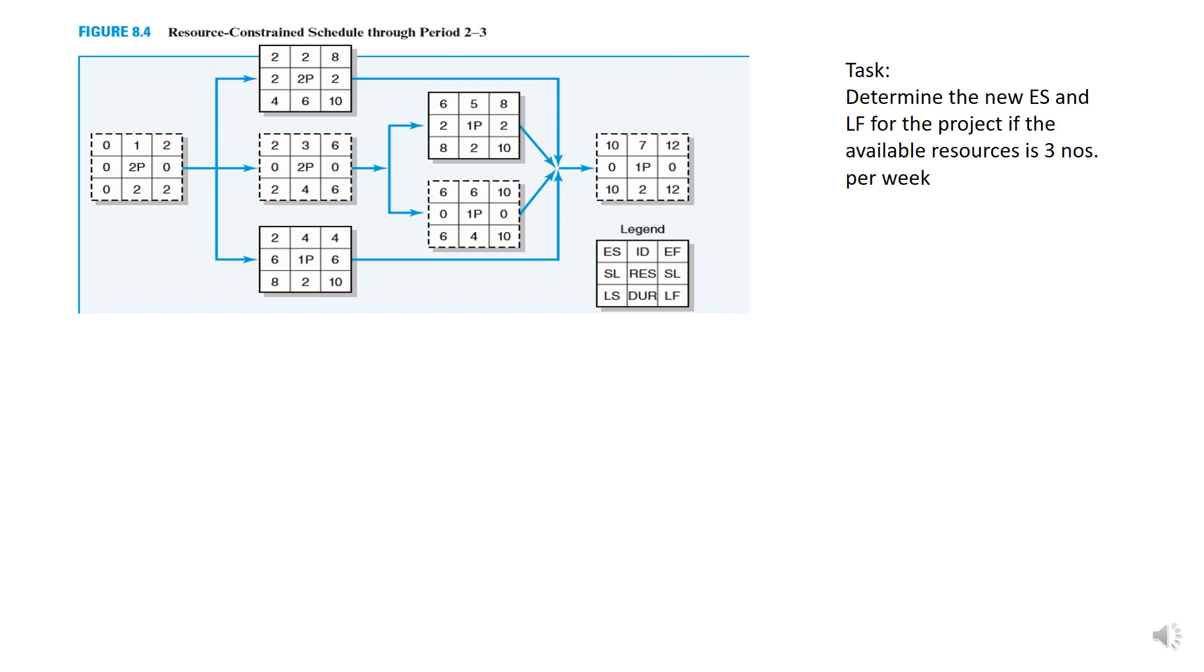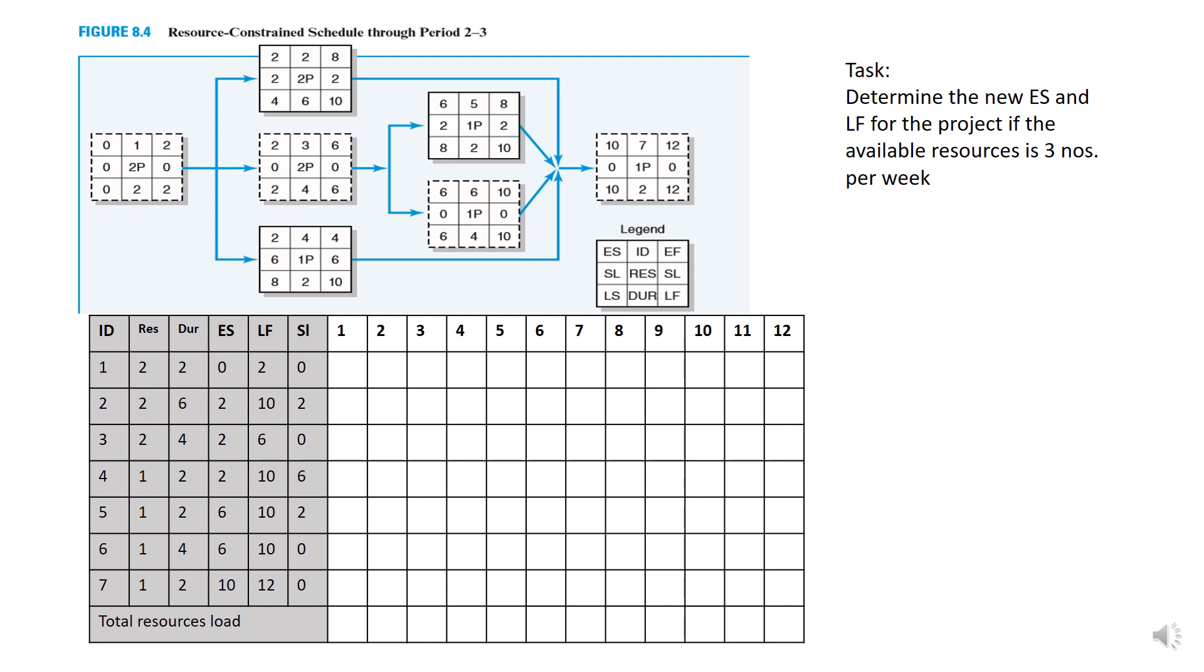The task is to determine the new early start and late finish for the project if the available resources is given as three numbers per week. What you need to do now is to create a table of resource schedule in terms of bar chart consisting of the ID of the activity, the number of the resources, the duration of each activity, the early start and late finish and also the slack.